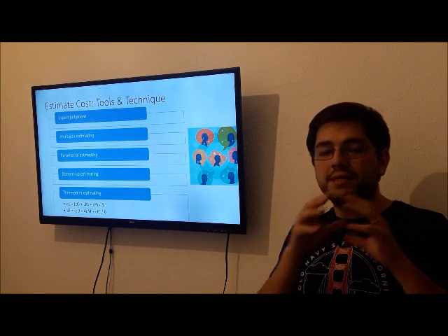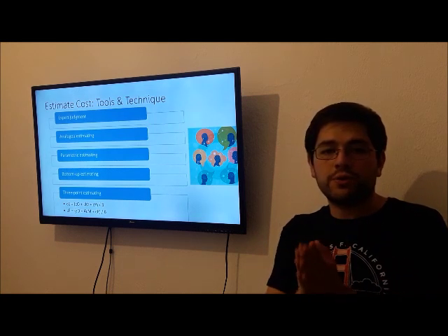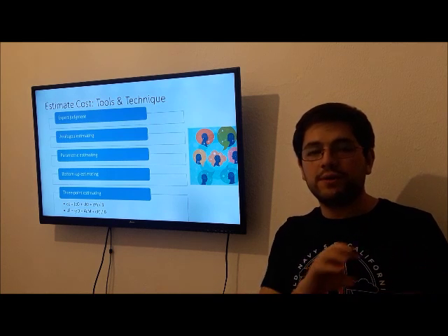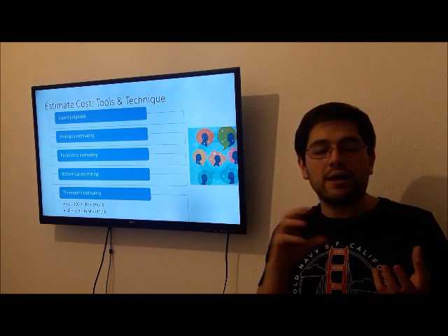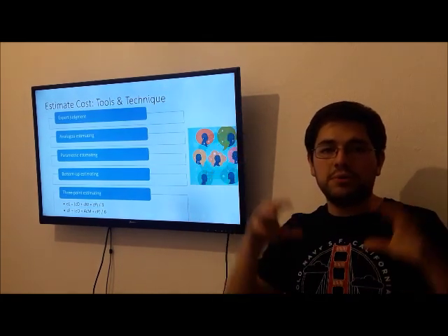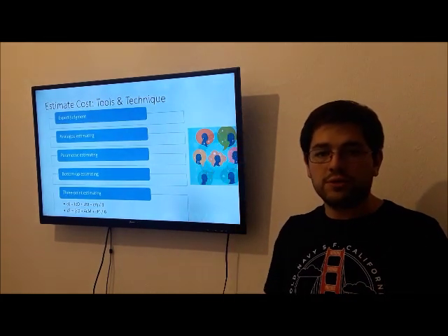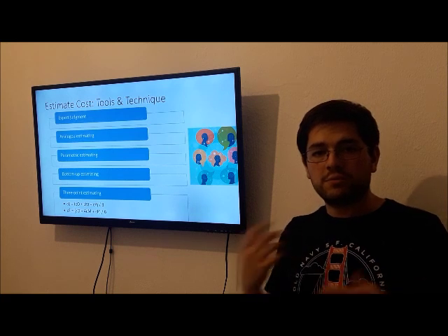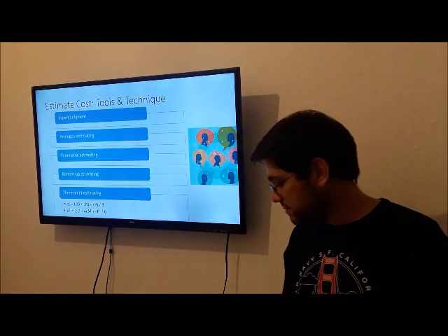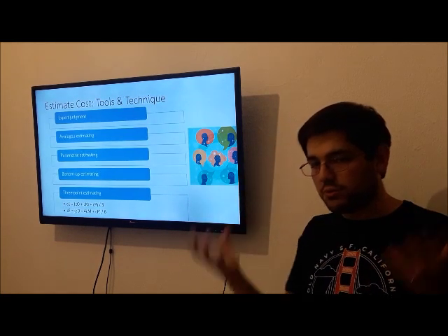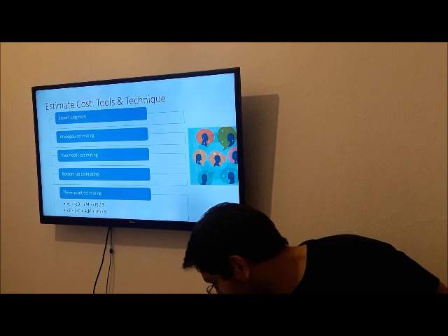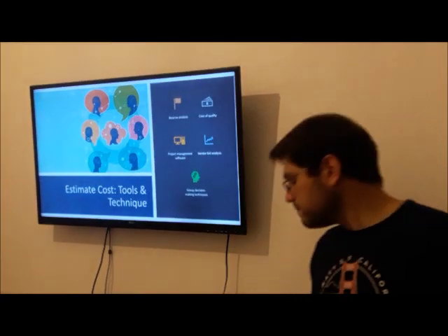We basically see how much we're going to spend in every object or every equipment that we're going to purchase, and we go scaling up, adding all the expenditures and analyzing how much the global expenditure is going to be.